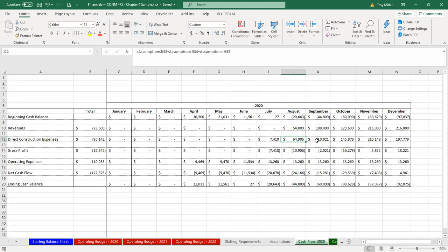Therefore, we're using the subcontractor as trade credit, and we don't really have an expense outflowing until that inflow comes in from the owner the following month. And so that's essentially how those direct expenses came into play.